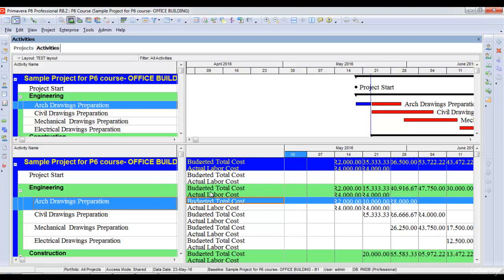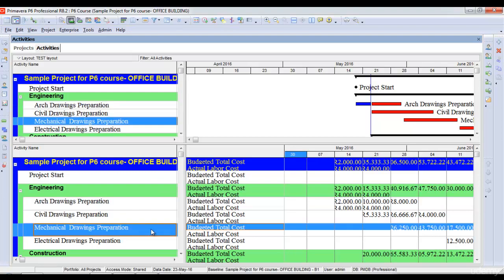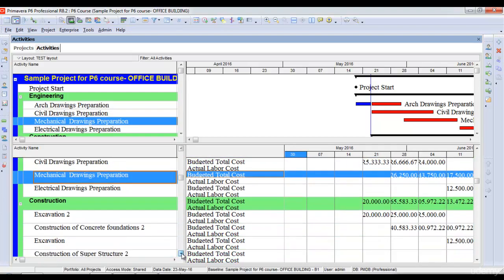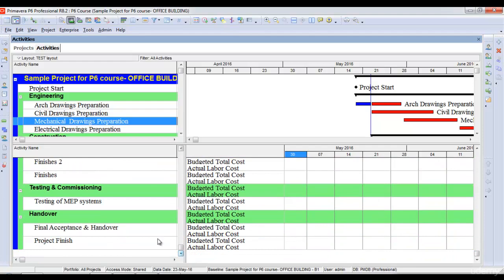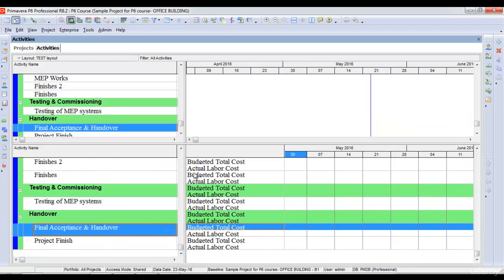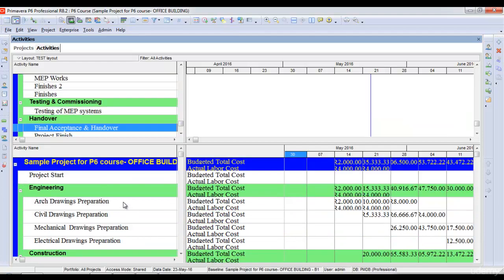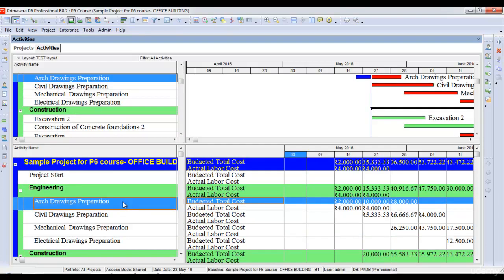I can see this budgeted total cost and actual total cost of each activity individually by just selecting the activity of which I want to see the cost. So I will highlight an individual activity and it can show me its budgeted monthly cost as well as the actual cost that has been recorded monthly.